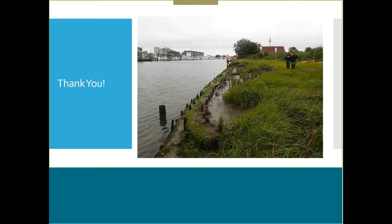Okay. And I know the one thing I don't have, I have the linear length, the 115 feet, but I did not calculate the area based on the extent that we're proposing. So that is one thing I needed to add, the area of wetlands that I plan on creating. Yeah, the area of impact as it relates to the core logs, what's the square footage or acreage, and the type of waters of the U.S. that will be impacted. Obviously, it would probably be the intertidal area, and it wouldn't necessarily be a loss. It would be more of a conversion from a mudflat to a tidal emergent wetland.